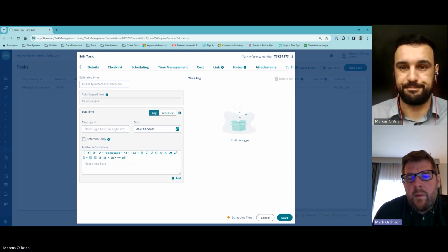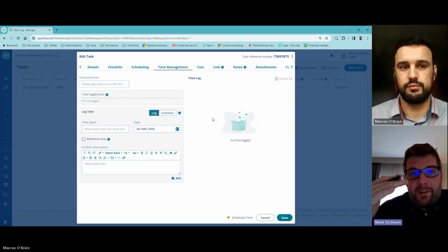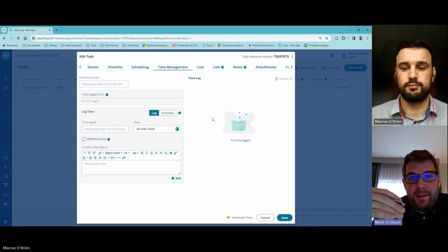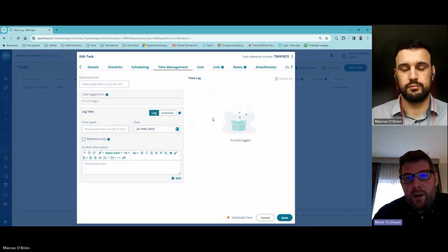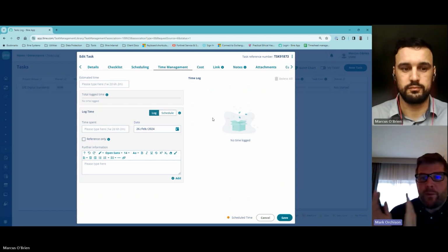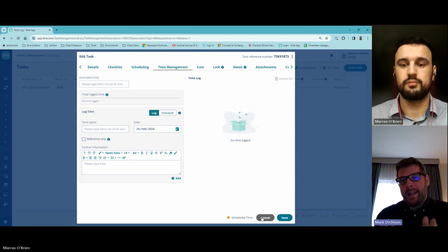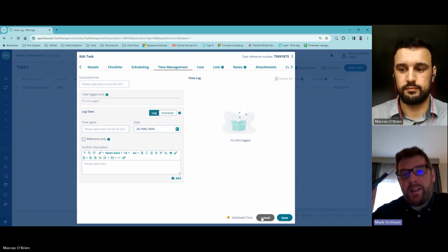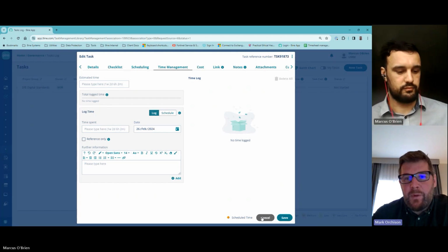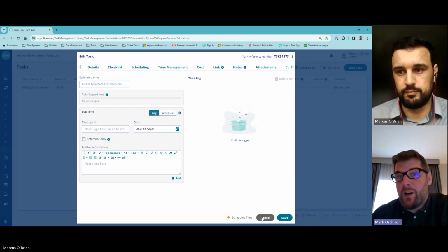at what time. But also, I think that's quite important because if you've done the exercise that you will have done and gone through all of the things that need to get completed, you then worked out the tasks and then estimated the time. That gives you a total amount of resource time that someone within the school needs to do in order to meet the standards. So just doing that exercise allows you to have quite a granular conversation with leadership about where you are, what's missing, but also how much time it's likely to take.